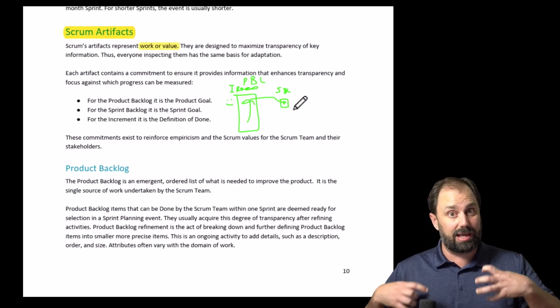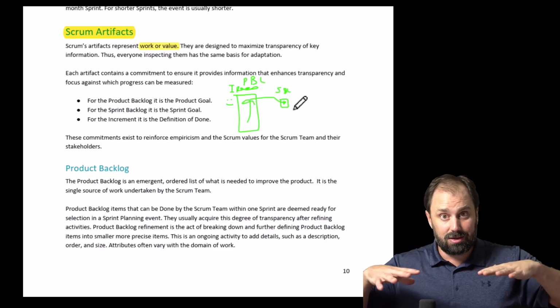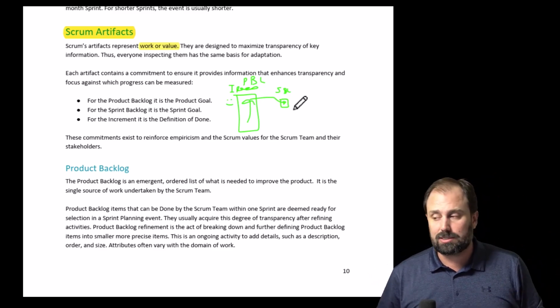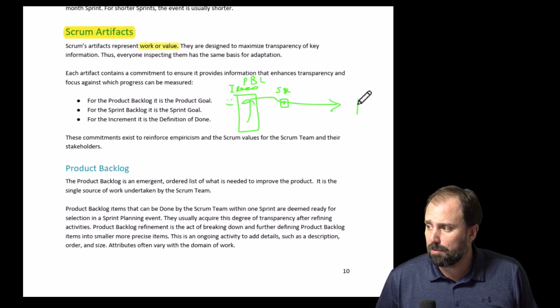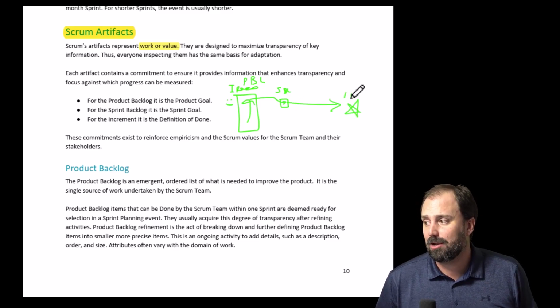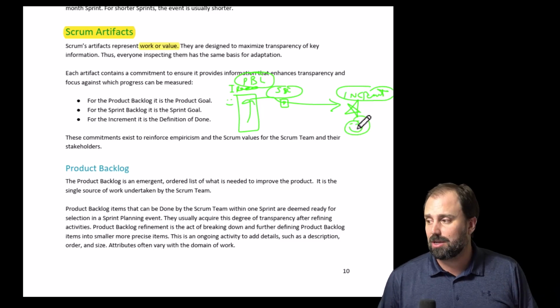Now these ideas are like on the hopper. They're on the oven, right? We're going to get ready, on the range. We're going to get ready to cook these things. And then boom, through the cooking, working together, we produce value. And that's the increment. So the three different artifacts are the product backlog, the sprint backlog, and the increment. Like the thing that the person can use, play with, all that stuff. That's what we want to do. So 1, 2, 3. That's what we got.